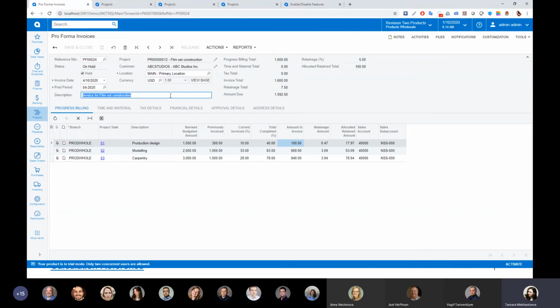That is because in this application number 3, we can exceed the cap if we do not perform some recalculation of the retainage amount. And in order not to exceed this cap, we use a differentiated formula. So we calculate the standard retainage and subtract some difference from it. And in case you are interested in all the formulas that are applied to retainage amount calculation, there are several iterations in retainage amount calculation. You will go to the page that will be specified in the presentation attached to this recording